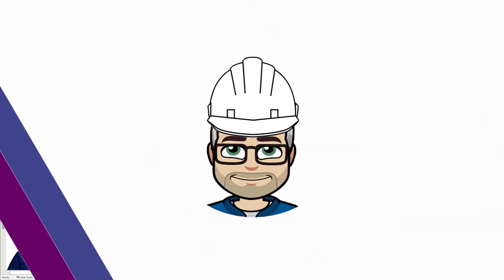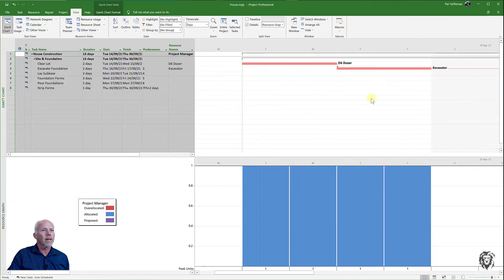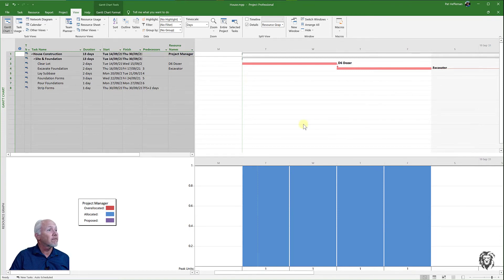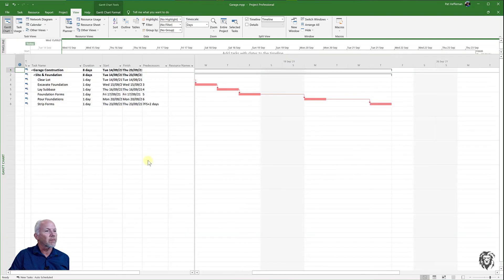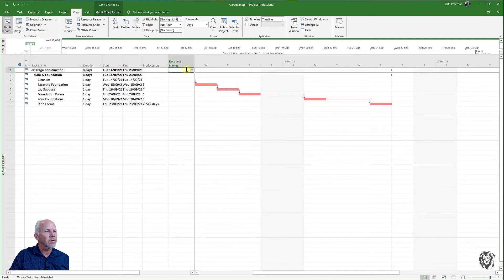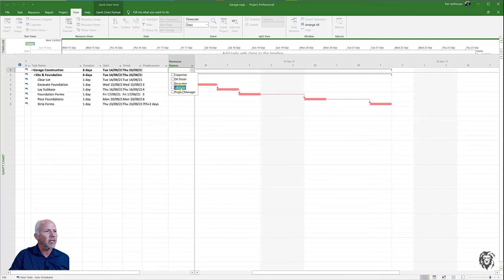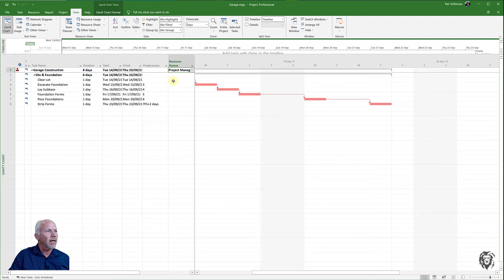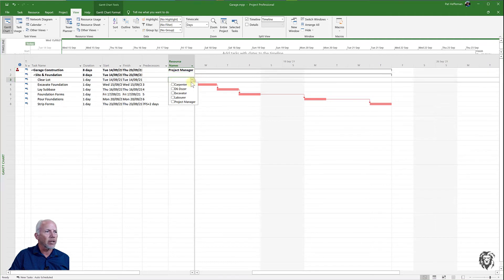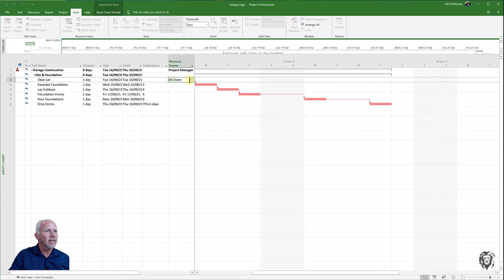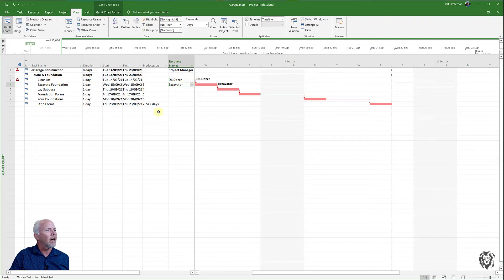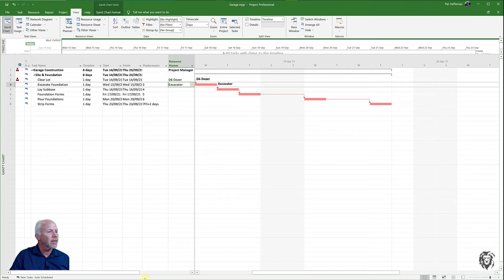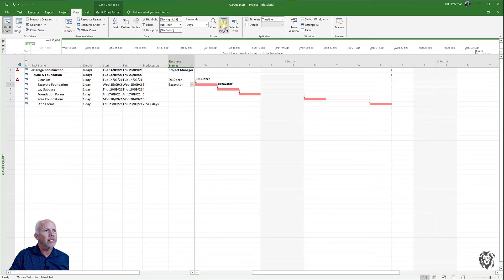I'm going to pop off to our garage project and do the same thing. I need to assign some resources so I'm going to assign the project manager to manage the project, then for the clearing of the lot I'm going to use the bulldozer and the excavator for our foundation excavation. I'm going to split our sheet to a detailed view.